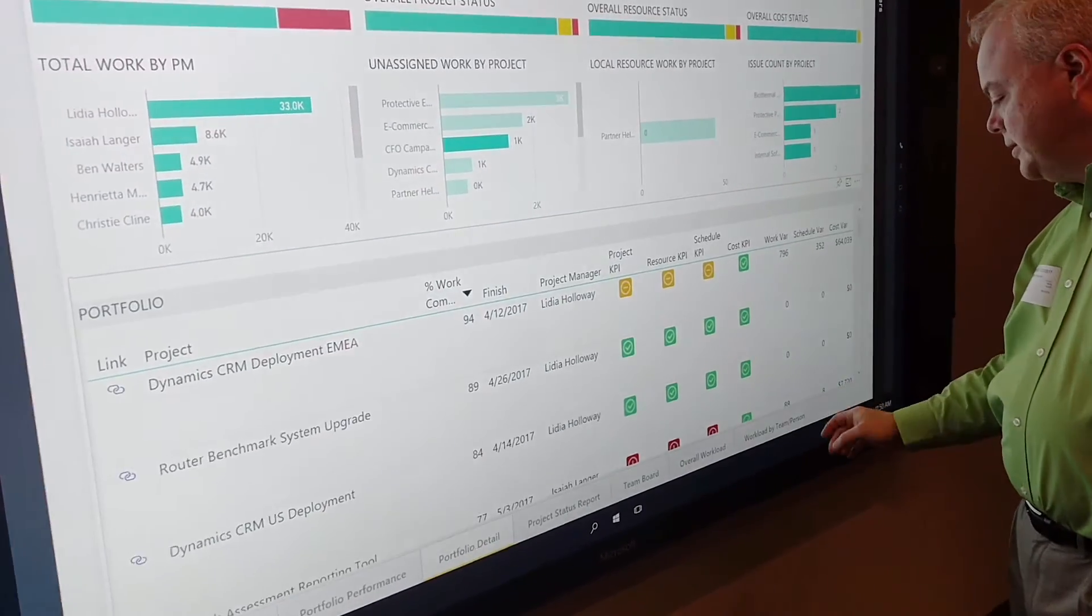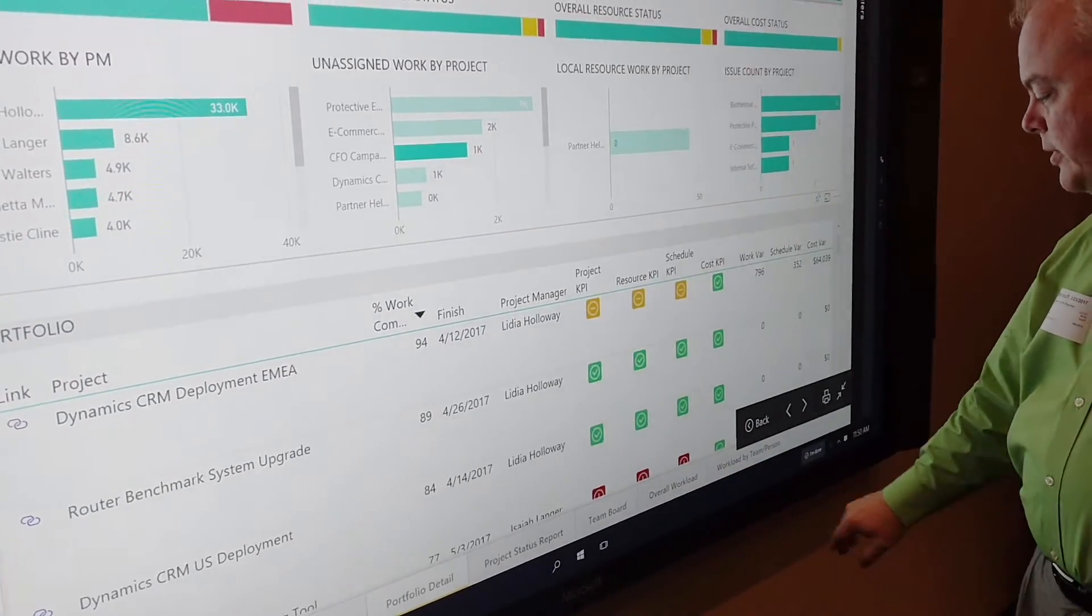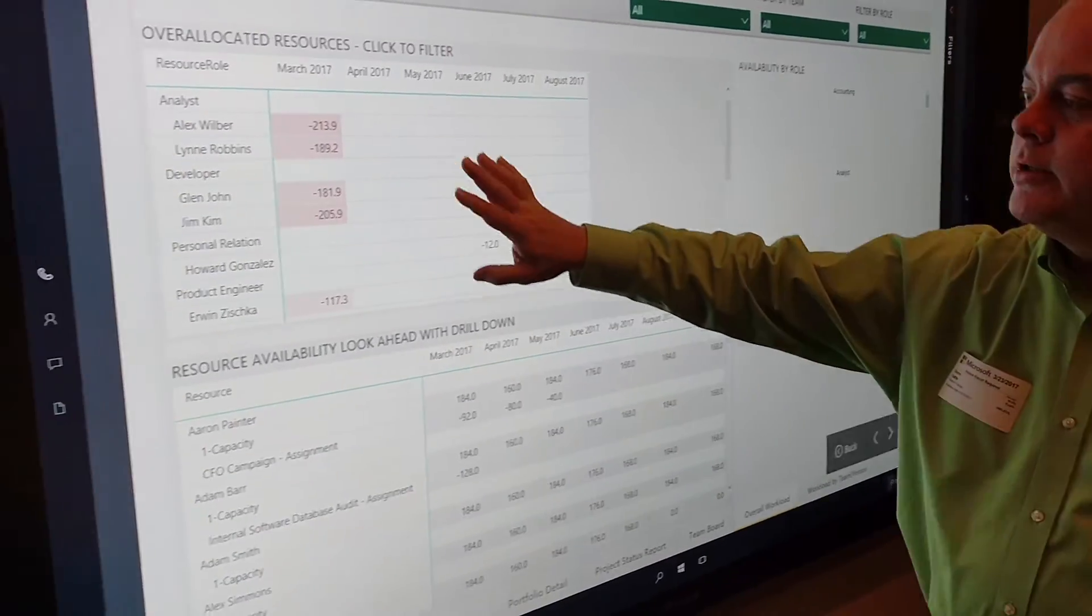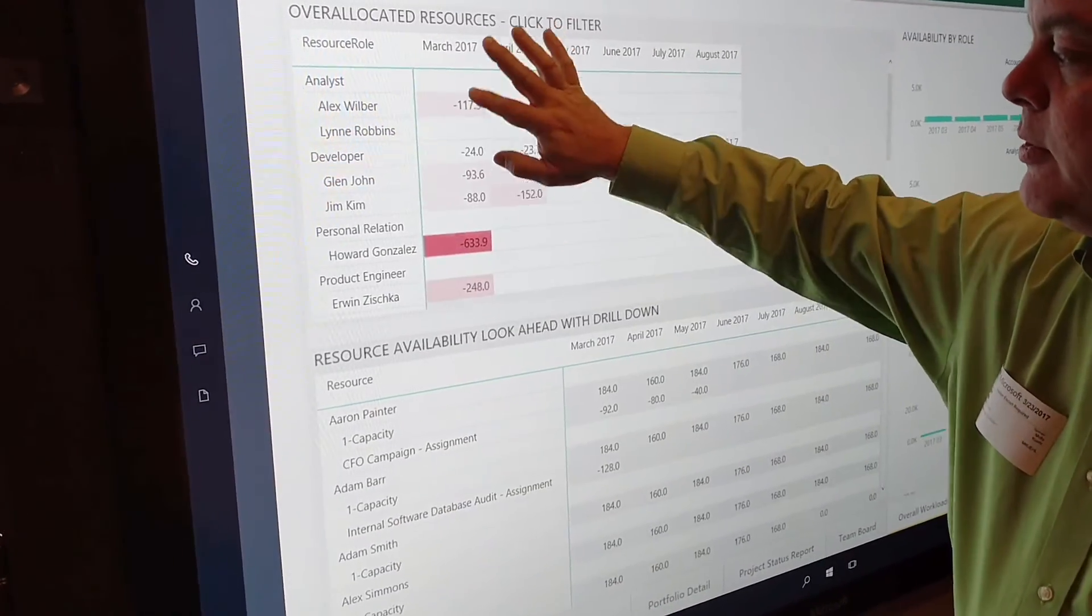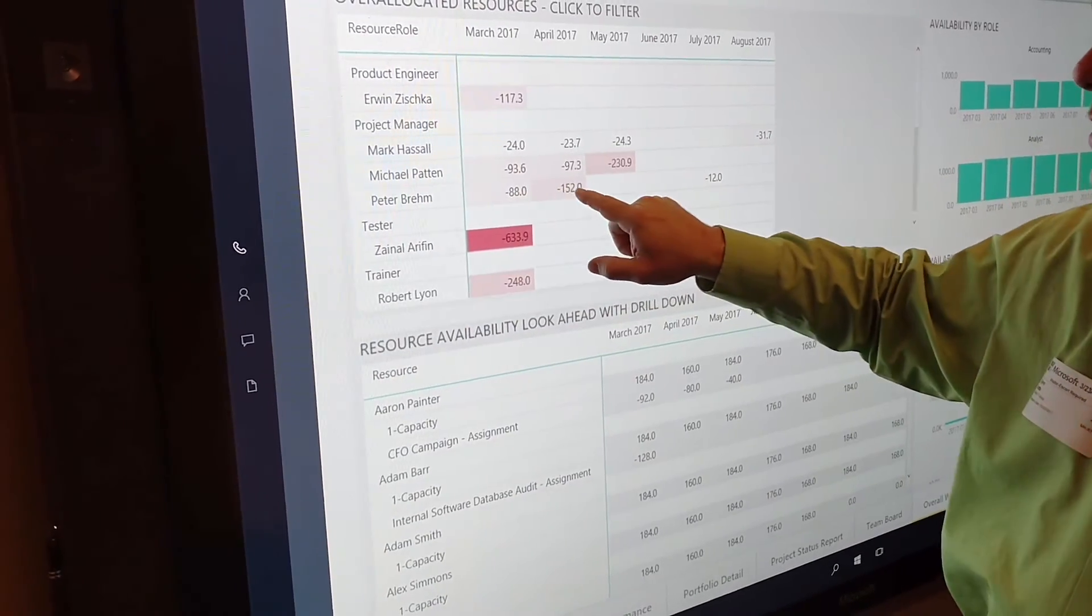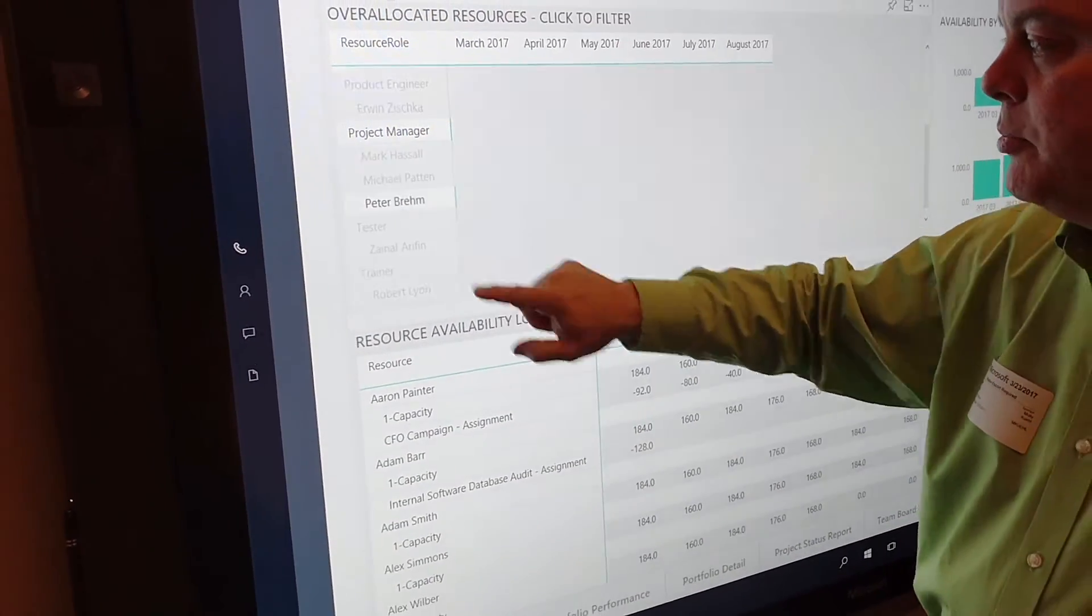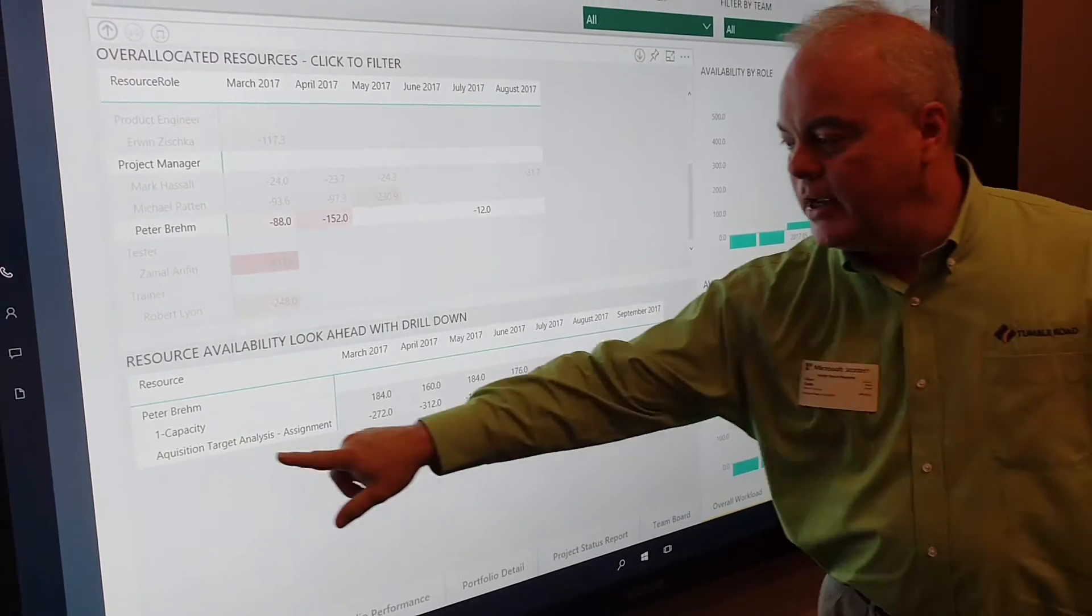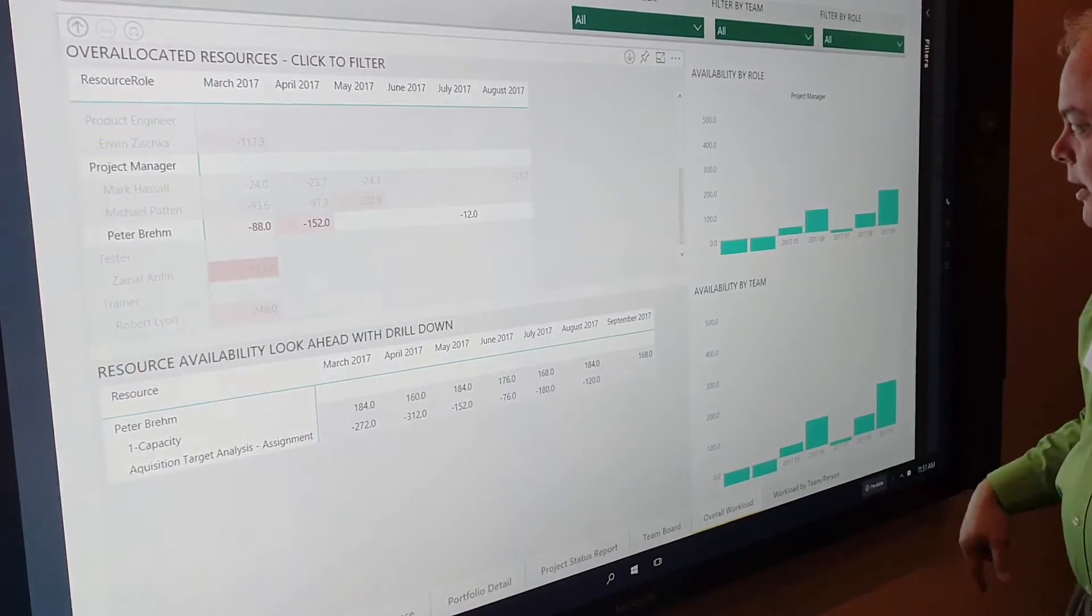Now, if we had an issue with a particular resource, we can go here and look for over-allocations. For example, if I'm scrolling through here and I see that Peter has a problem, if I click on Peter, it's going to automatically filter everything so I can see exactly what projects he's on.